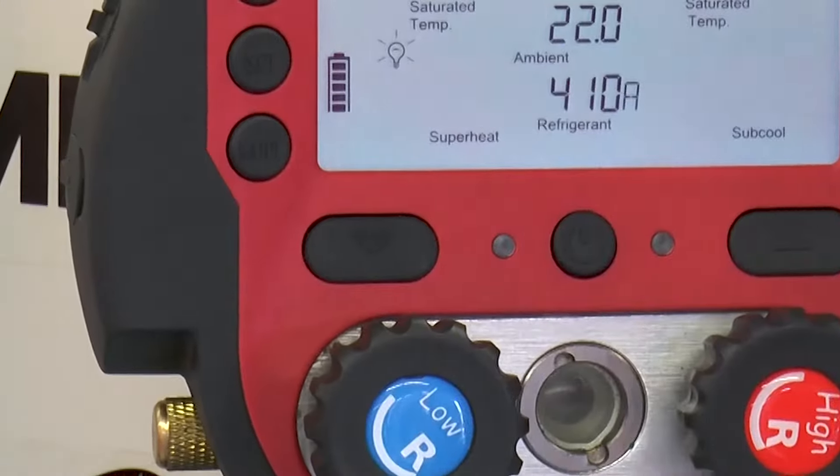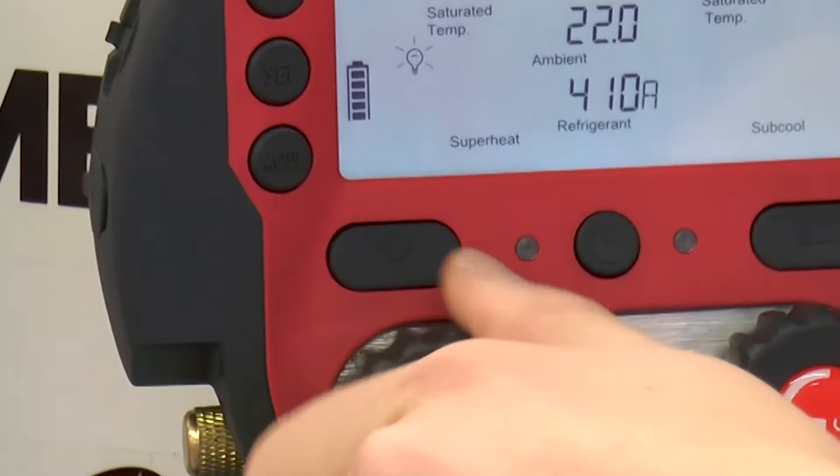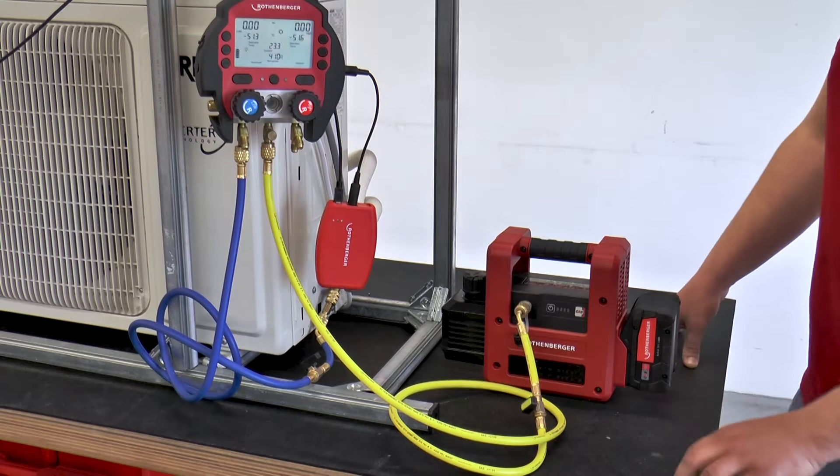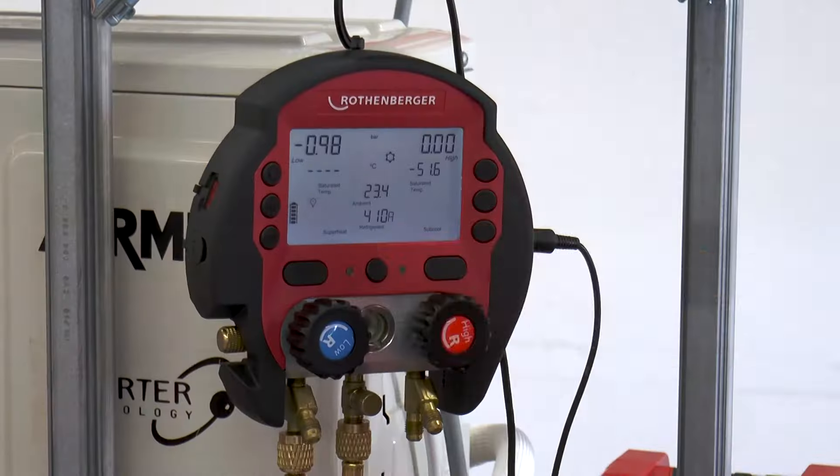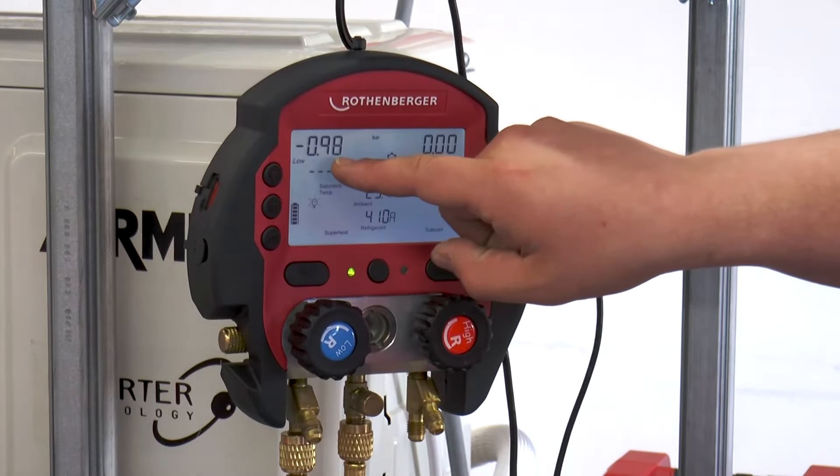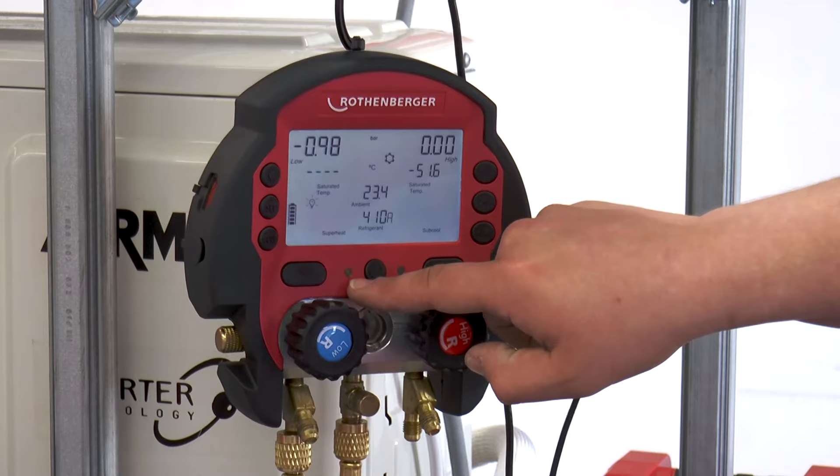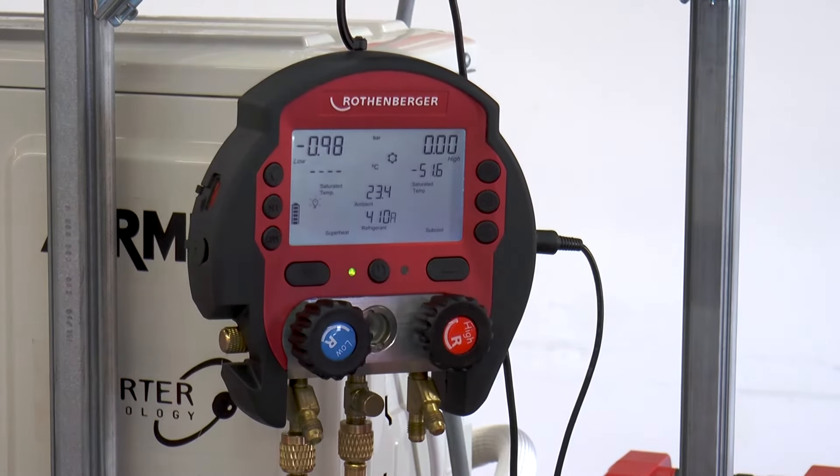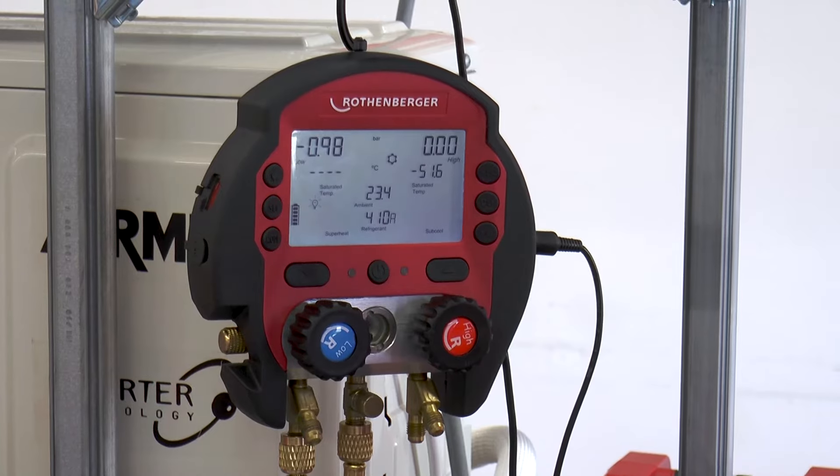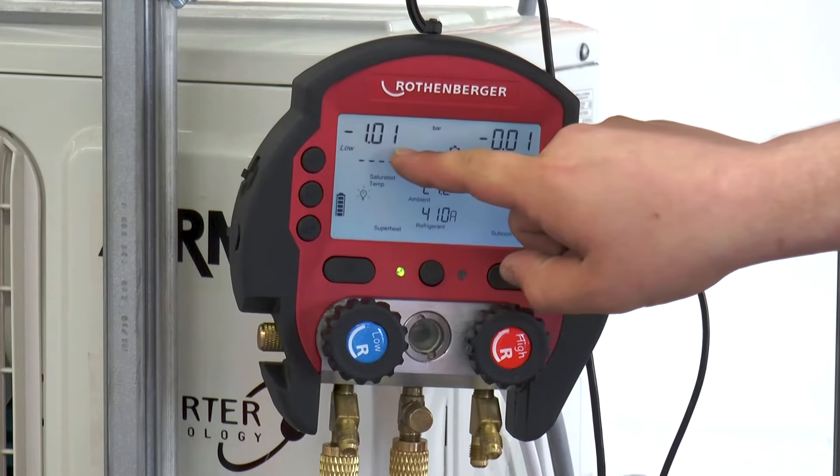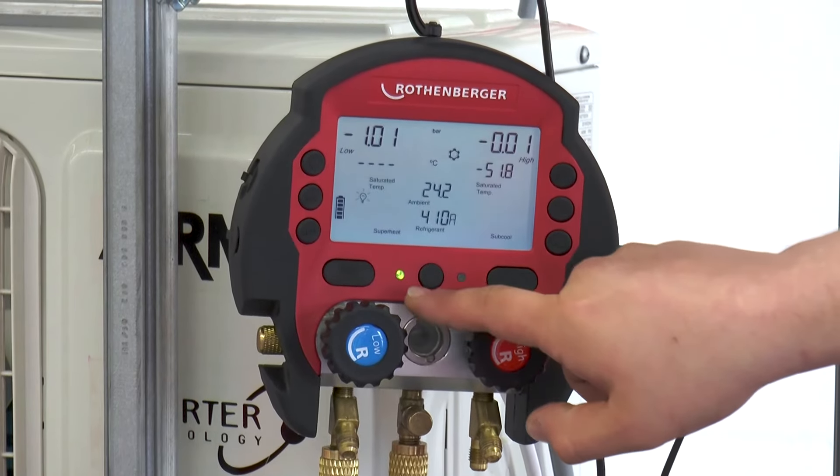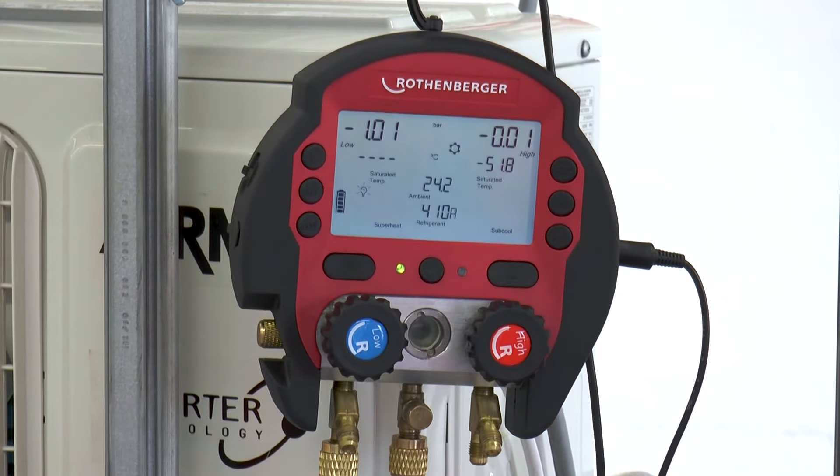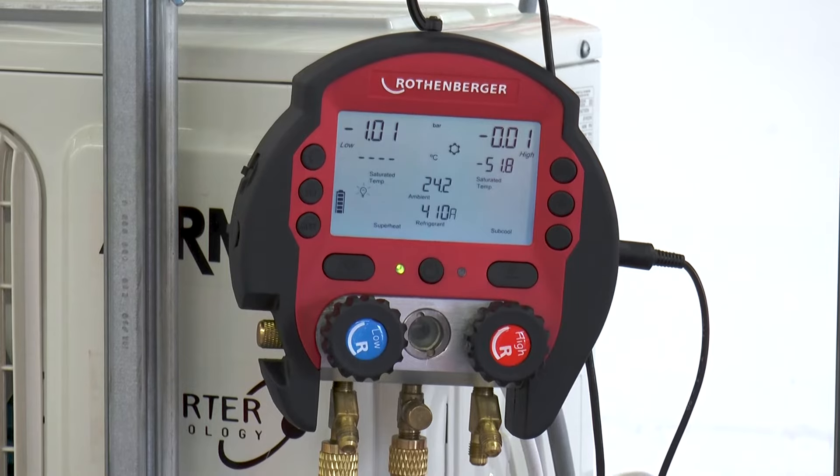For this, the shut-off valve on the low-pressure side is closed. Now, the vacuum pump can be switched off and disconnected from the working hose. A green flashing LED can now be seen on the Rokul. This green flashing LED starts flashing from a vacuum range of minus 0.98 bar. If the pressure remains constantly in this low range, this green flashing LED will stop flashing after 30 minutes and will light up continuously.